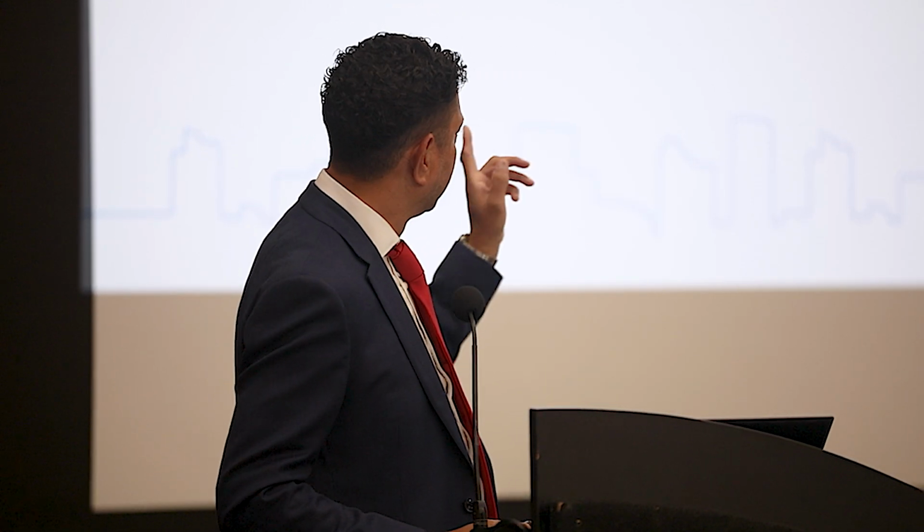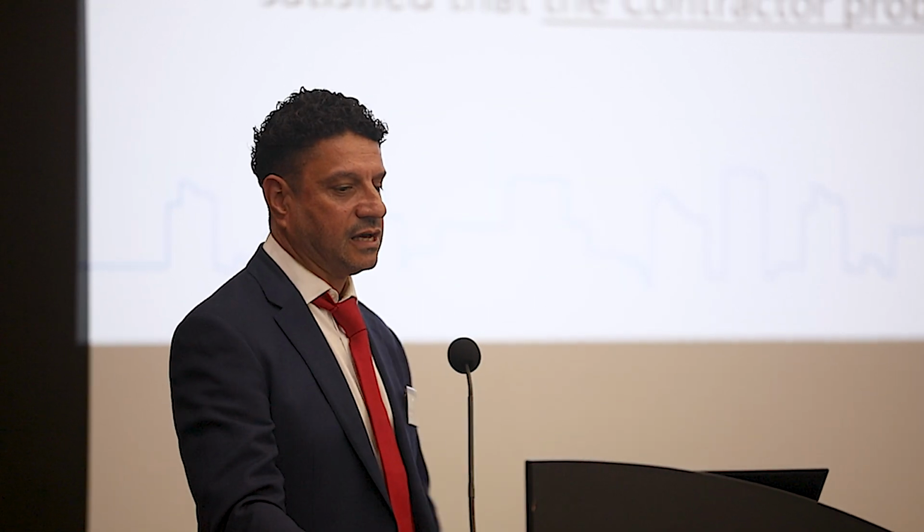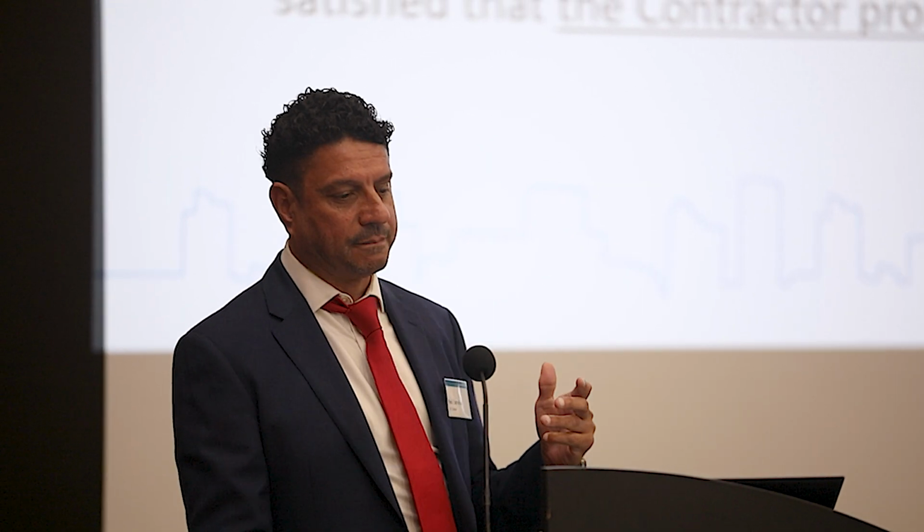That's got to be wrong. So, remember the message here is about not having to be certain, balance of probabilities, that loss, expense in a JCT contract, defined cost, impact on planned completion in NEC, just have to be more certain than not that it was incurred.